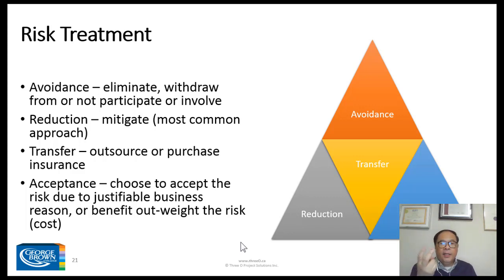There's two ways of doing that. So using the technology situation, the Bitcoin thing, instead of avoiding it, okay, we can actually say, since I don't want to carry those risks, I'm going to get a consulting, I'm going to get a cloud service, I'm going to get someone outside to help me to develop the Bitcoin technology. So the risk is being transferred. They are bearing the risk, either they are more experienced, they have done those before, so I only get the finished product. So I have much less risk.